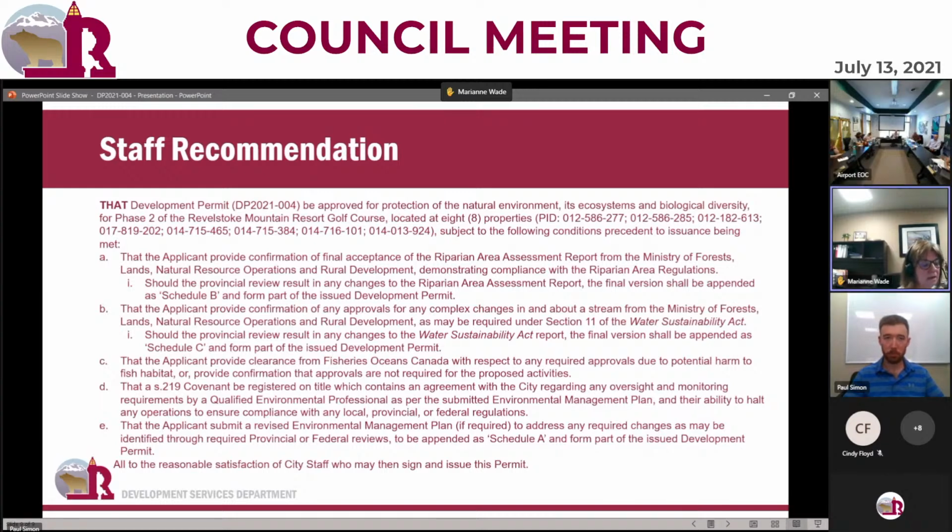Yes, Your Worship, I just wanted to add, it's important to note that with the Riparian Assessment and Water Sustainability Act, there was a delegation down to municipalities, and it's something that we need to address in our OCP, that we have a responsibility to ensure that those approvals are received from those provincial jurisdictions, but we also have a responsibility to have a management plan and have a QEP oversee that to ensure that there's an alignment, and that responsibility lies with ourselves, and that's why we have a management plan and an agreement with the RMR so that we can make sure that we're following through with what our obligations are that have been delegated down to a municipality. Great, thank you.